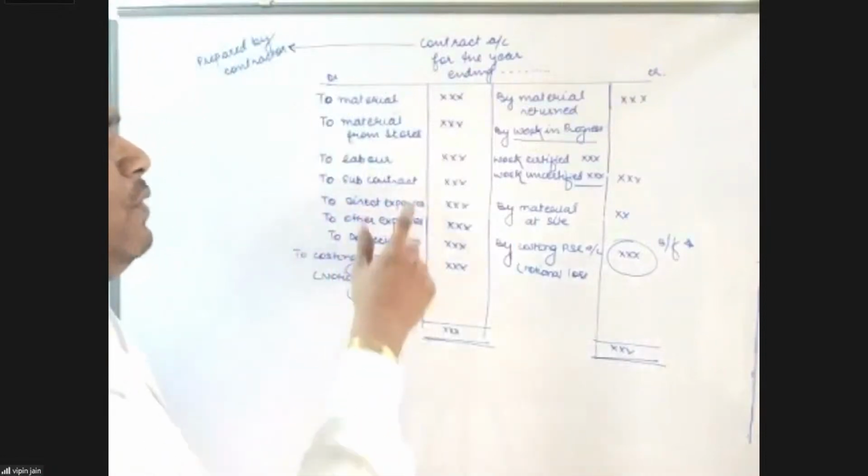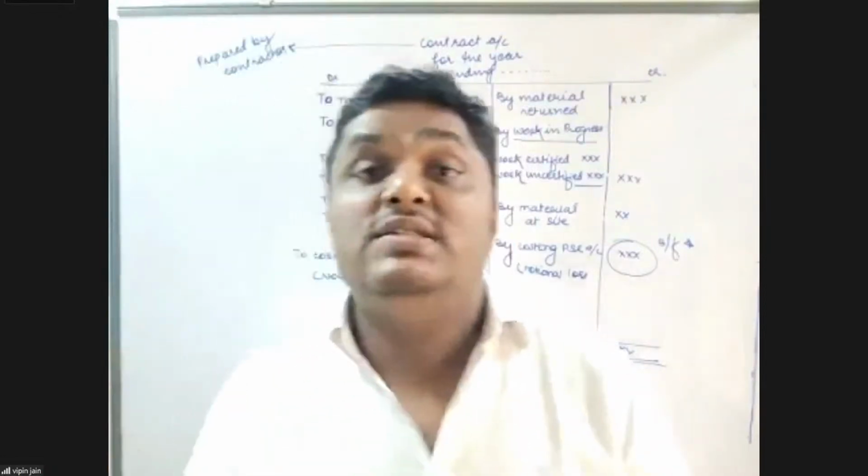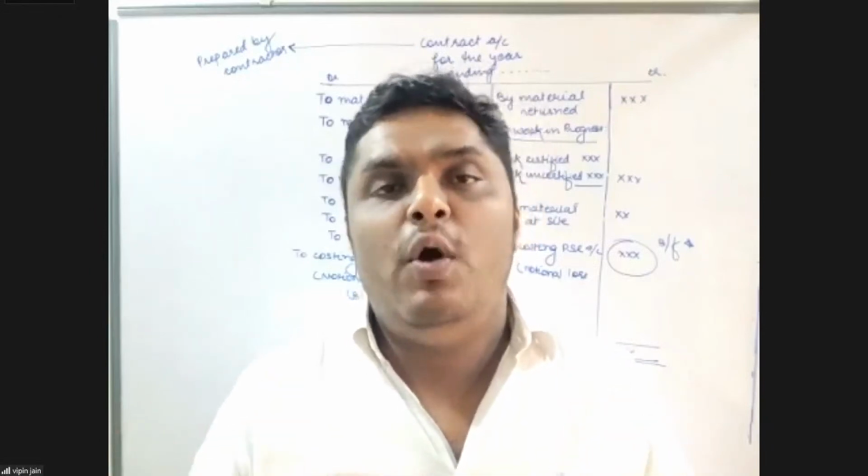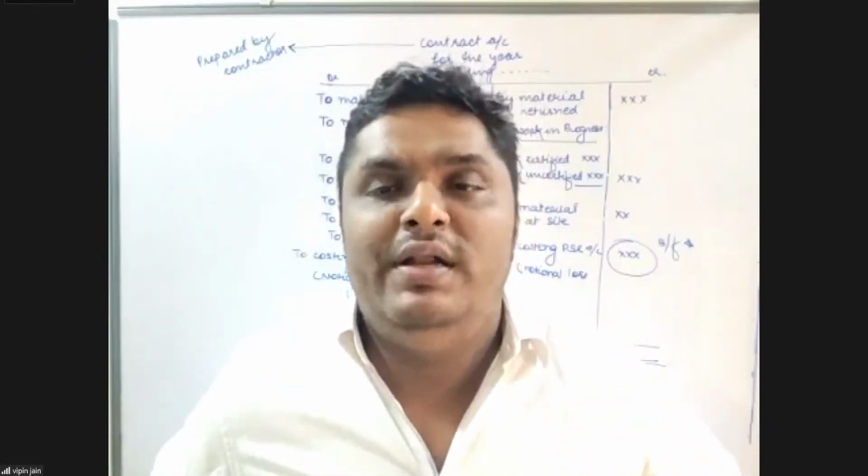It is subcontract. If we have given any work on subcontract, whatever cost is paid to the subcontractor is to be debited to the contract account.